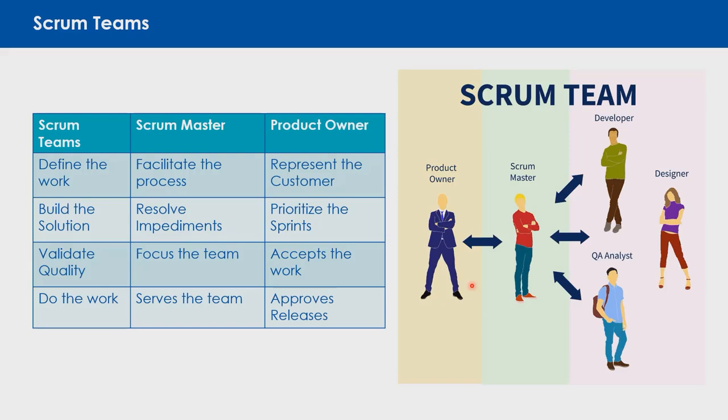They define the work, meaning they take the tasks that are in the backlog, the stories that are in the backlog, and they break them down into buildable, deliverable, very well understood user stories. And they do this in conjunction and in collaboration with the product owner. They build the solution, meaning they make it executable, they test it, and they deliver the work.